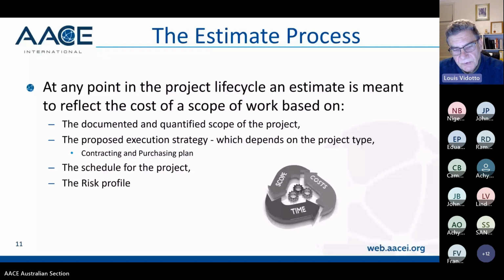Again, the schedule for the project is important. A lot of costs are really time-based, particularly a lot of your management team. If a project schedule overruns, then that automatically overruns the time for a lot of your management team. So it's important to know what the realistic schedule is for the job. The risk profile.